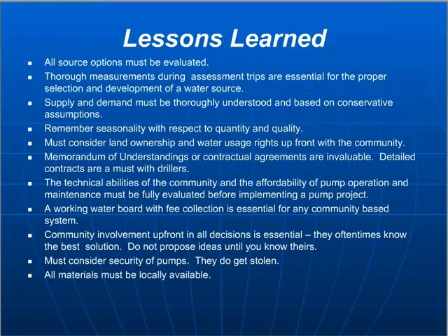Seasonality we've discussed, land ownership we've discussed. A memorandum of understanding we haven't discussed as much, but that's just a contractual agreement that has proven to be very valuable with projects, especially with drillers, some sort of contract, to put things in writing to make sure that everybody truly is on the same page with who's responsible for what and who's contributing what to the project. The technical abilities of the community and the affordability of pump or system operation is essential to think about up front in the source selection process.